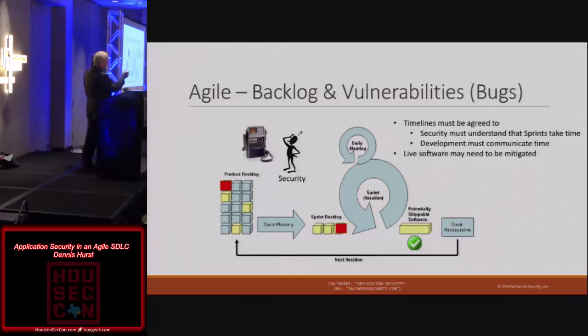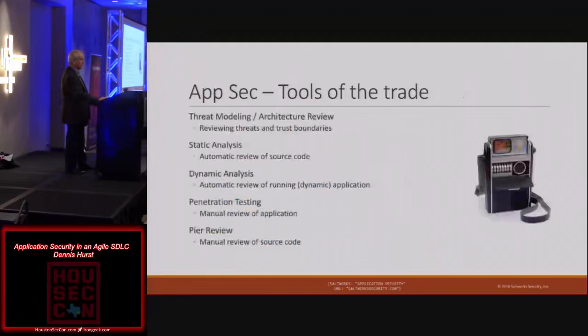If you can get hooked in that portion of the phase, that helps a lot. Now, some testing also takes a while, so with outsourcers, it gets a little worse. For example, if you need to do a penetration test, that takes 3, 4, 5 days, 2 weeks. What you've got to remember as security is that those defects that you give them are going to go in the next scrum down the road. So you kind of have to mentally start thinking, okay, if I get the results back next Tuesday, I know the next scrum doesn't start for 2 weeks, and then that means they can fix them. That gives you a realistic timeline of when you think you're going to get these fixes back. But yeah, integrating with outsourcers can be a little bit of a challenge, so it certainly makes things a little bit more complex.